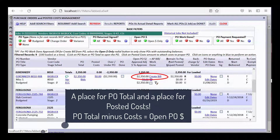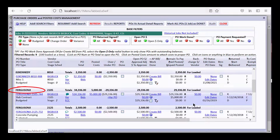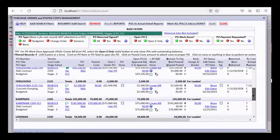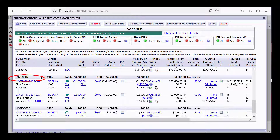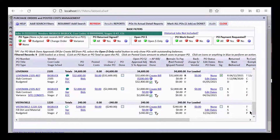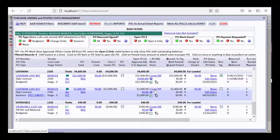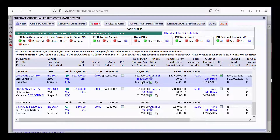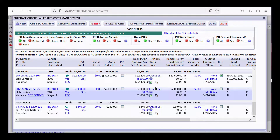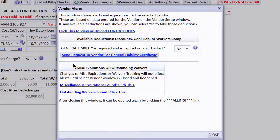You can click to create a bill and it'll just start the bill for you. Let's create the bill. Notice the first thing CHS does — whether I create from scratch or not — is go out and check for things to warn us about. It's warning us that the general liability is required and is expired or low. Let me click to view or upload the control docs, upload the certificate, and I can see it expires 9/30/2023. Save that and close.